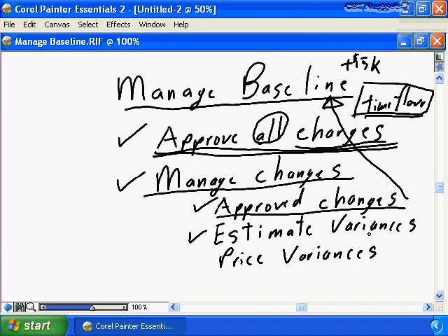Hopefully over the life of your project, you will have some plus estimate variances, where it's taken more time to deliver your project, i.e. therefore more dollars. Hopefully you will have some minus estimate variances, where you were overly pessimistic with the development of your estimate and it took less time, therefore less dollars to deliver the project. There will be some give and take with the pluses and the minuses. You need to understand what the net of the pluses and minuses are going to be, and alert management, alert your sponsor that says, there have been problems on my project as a result of bad estimates, and there's no shame in saying there were bad estimates.